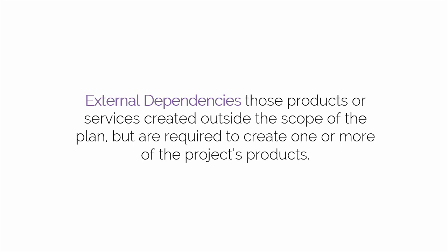Using the same conference project example, if you were to use any promotional material from a previous conference project to design collaterals for the current project, the promotional materials from the previous project would be treated as an external dependency.